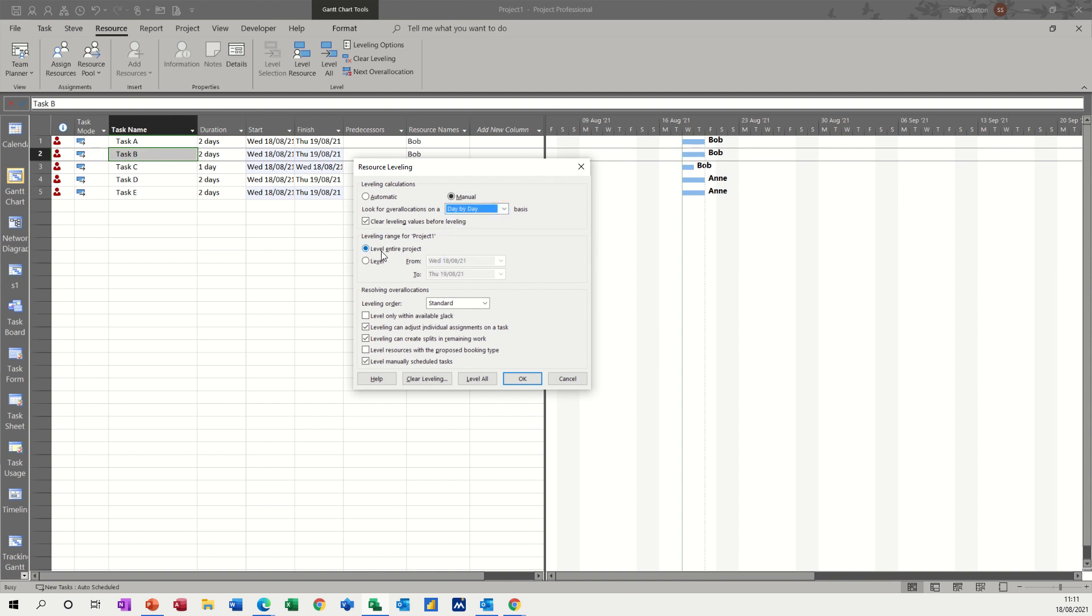You've got entire project ticked, but you could level between a date and an end date, a start date and an end date.